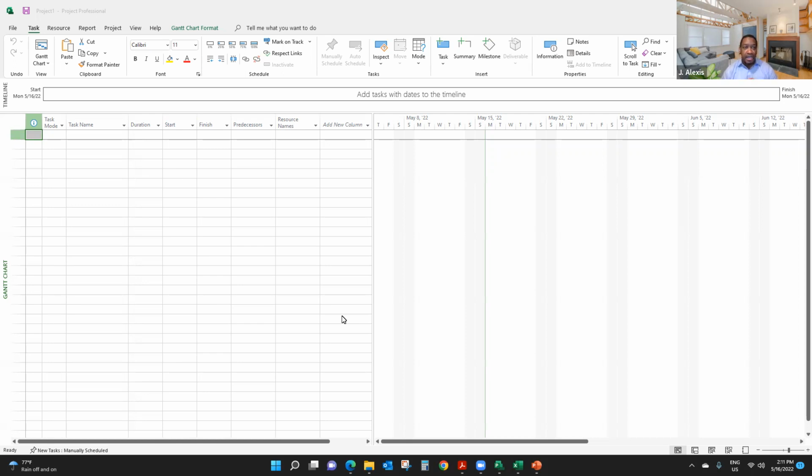So we are going to take a look at two key assumptions here. The first one is the fact that Microsoft Project is effort-driven. In other words, if I have work to do, if I assign people to do this work, if I need to go faster or expedite my work, if I add more people to the work, maybe I can do it faster.